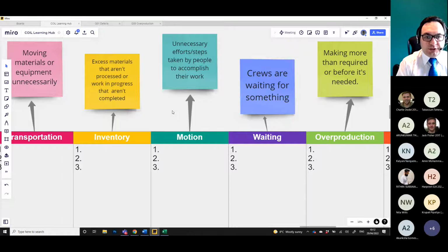There's an error in the drawing, so we just leave that task and start another task. Again, we carry out a bit of that task, and again, we cannot complete it. Go to the next task, next task, next task. So you have lots of tasks that are not finished. Yeah, we call this work in progress, and it is a kind of inventory waste.